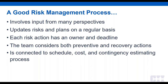There are other things, like social distancing requirements, that are no longer risks — they are issues we have to deal with. Things like additional lunch and break facilities, taking breaks in shifts, additional buses to bring people to site — all those things to maintain social distancing are now issues, not risks. The risk landscape changes constantly, and it's our job as project managers to stay on top of that. Each risk has an owner and a deadline assigned to it. The team considers both preventive actions — those that can prevent the risk event — and recovery actions if it does occur. A good risk management process is also linked to the schedule, cost, and contingency estimating process.